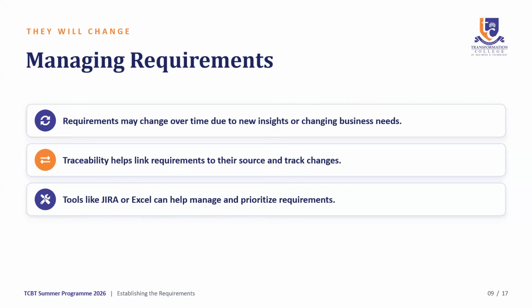You want to ensure that your processes are properly tracked, rather, or traced to their source. And if there's any need for change, all stakeholders are brought to the table. All stakeholders are put into consideration, and have a common agreement as to the change involved. And there's a sign off.